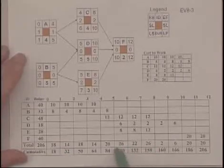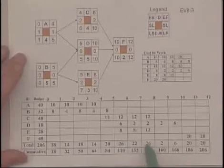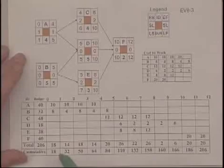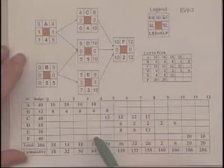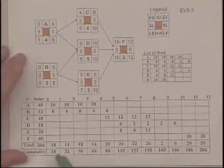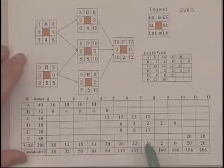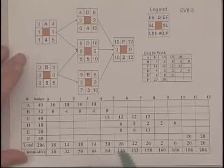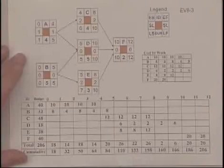One of the things to keep in mind is that costs on a project aren't static; they vary depending upon the workflow and the nature of the activities being performed. We create this time-phased budget so that we can check and monitor our progress. This will become very important when it comes time to assessing actual performance, when we compare how well we're doing in reality to this planned anticipated budget.